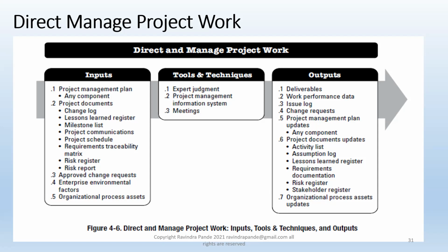Again, there are a couple of processes here. Approved means normally the client approves it. Sanctioned means there's a scenario attached to it, there's a priority attached to it. And then accepted in the sense that your organization's change control board or some configuration manager accepts that thing in terms of your development plan.